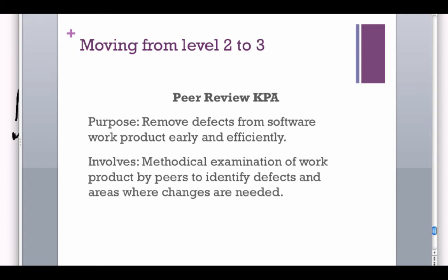So a peer review can last anywhere from a half hour to literally tens of hours worth of work. And to get 5 or 6 people in a room and spend 10 hours at a time, that's basically 60 man hours where no new work is being accomplished. Nothing new is being created.